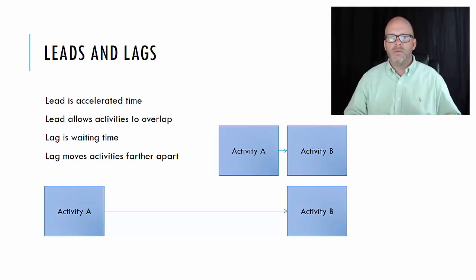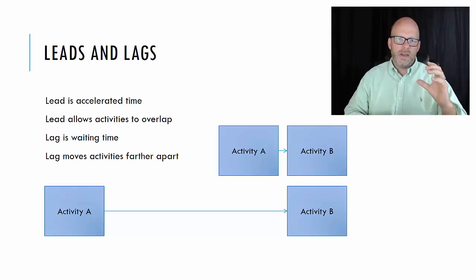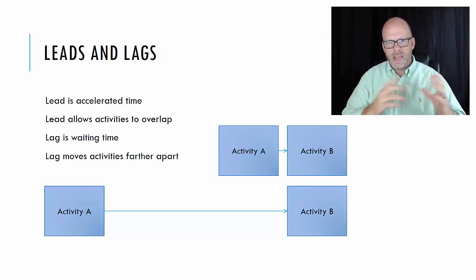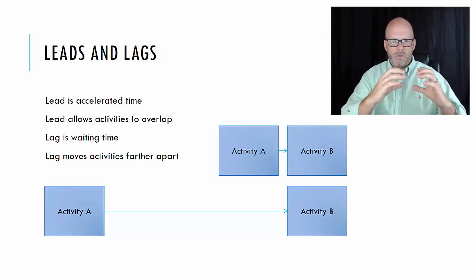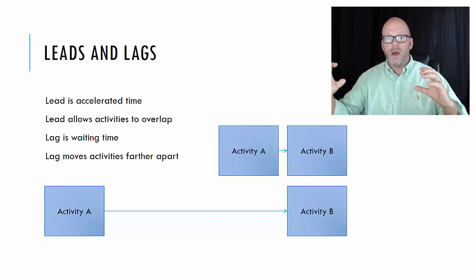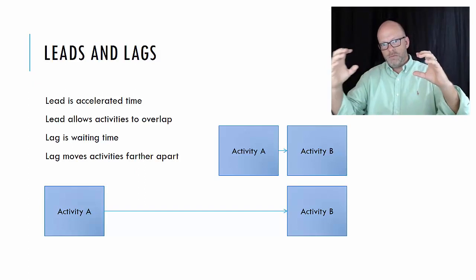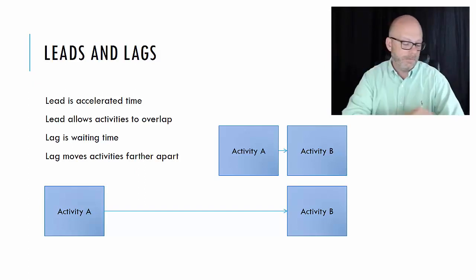So ordinarily, as soon as we pour the concrete and it's cured, we can begin framing. That's only 8 hours or overnight. Well, because it's so hot and humid, we're going to add 24 hours, a whole day of waiting. So lag time moves activities further apart.